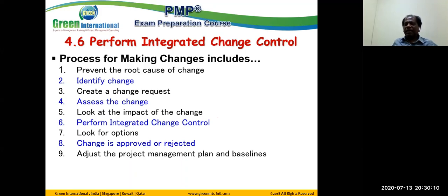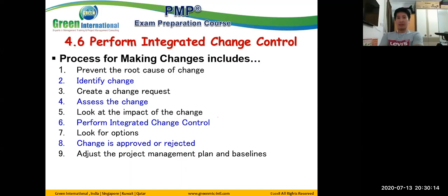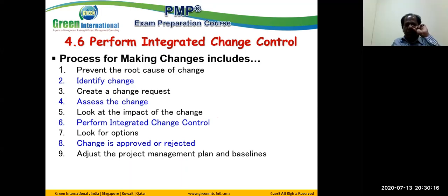Then only he takes a decision. And then they will pass it through and give you the variation order. Yes, that's what the change control board is for, decisions. The final document is your engineer instruction with the variation order. That's the final result of the change control board action.